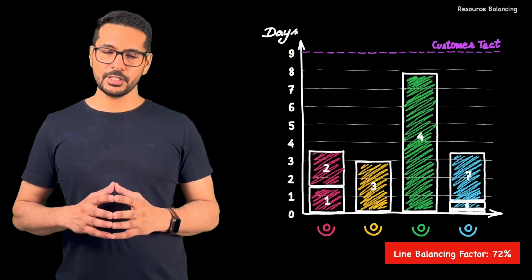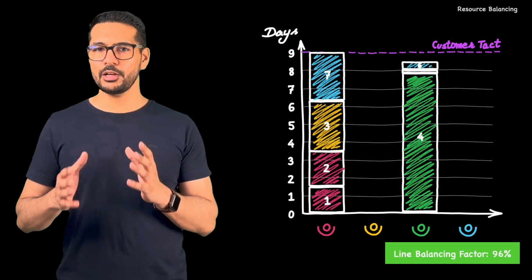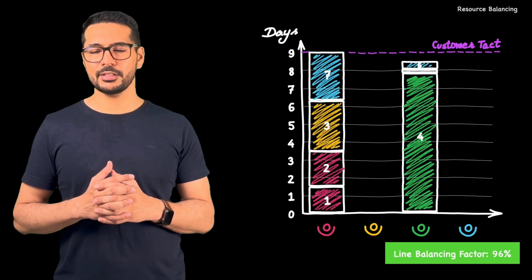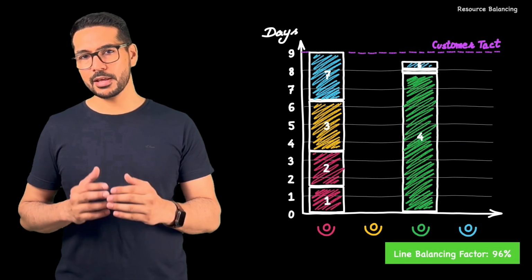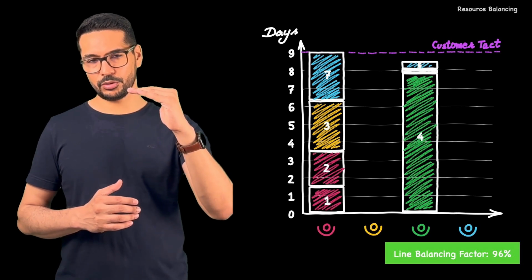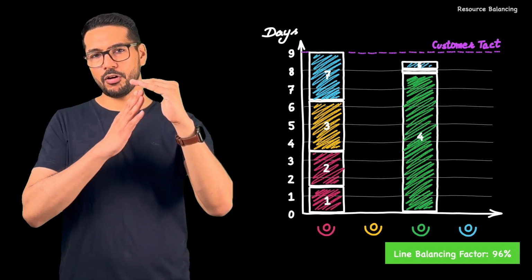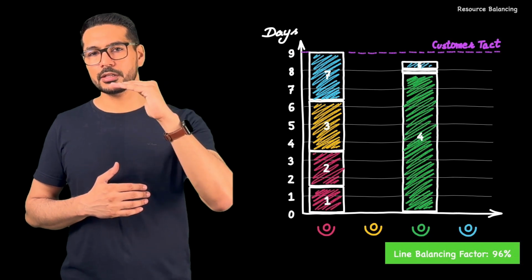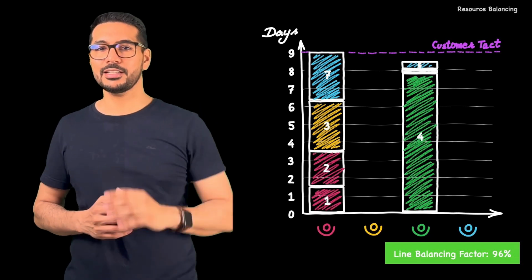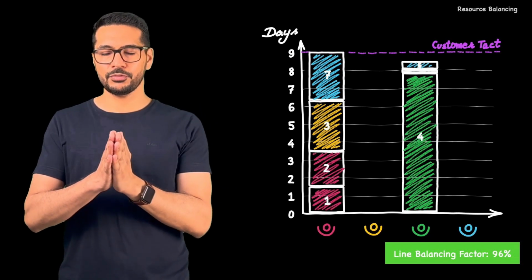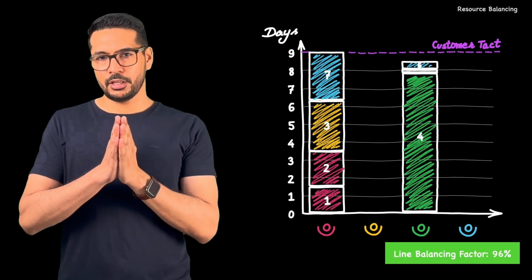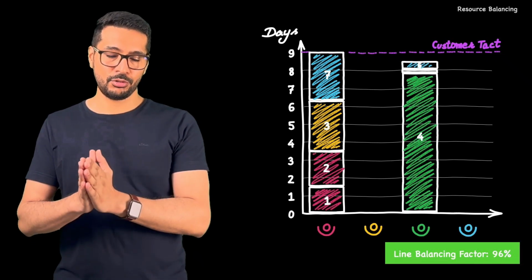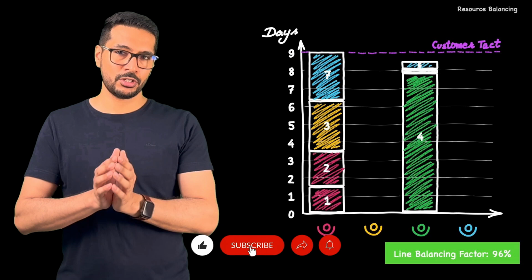If we shift these tasks and reallocate them in a way that we still remain under the customer target, which means our speed of delivering these tasks is still quicker than the customer is asking, in that case we can remove employees number 2 and 4 because they are not required.